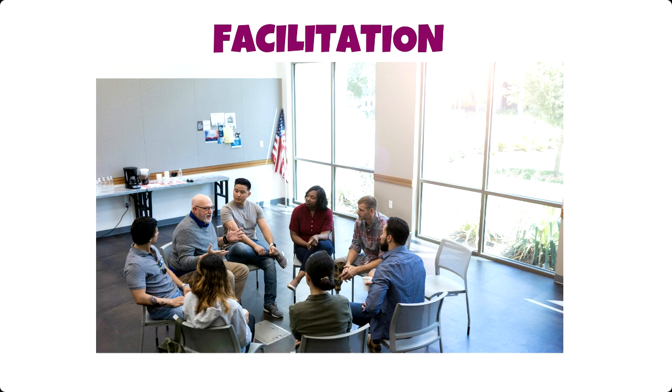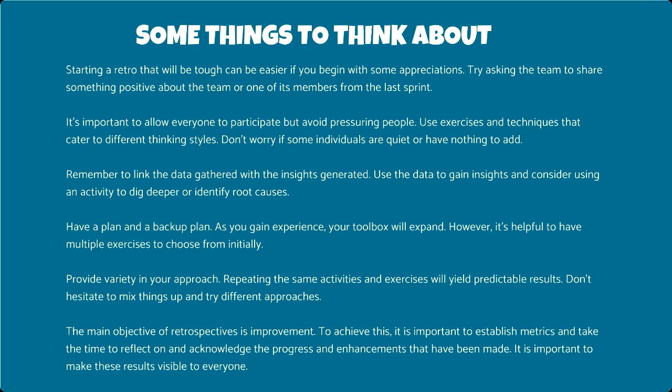Okay, so a few other things to think about. Sometimes if we've got tough conversations to have in our retro, we can start with something like appreciations or something that's awesome. It can be super helpful in starting us off on a great foot and in a frame of mind where we're really focused on the problems. Alrighty, that's the other thing. It's so important to make sure that we're keeping focus on problems and not letting our retros fall into a blame game about this person did this and that person did that, and none of that is helpful. We want to really make sure we focus on problems.